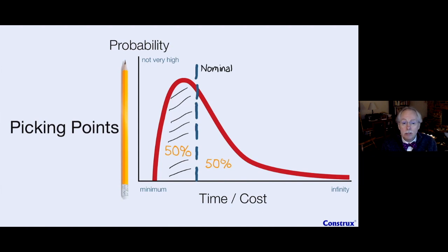Now, a lot of people like this point in the world of estimation because it makes combining estimates and conversing about them easier; it gives them a common point of reference. And so we often use this as professional estimators to express an estimate. But the estimate is the entire curve. It's not just this one point. So we have to call it the nominal point.